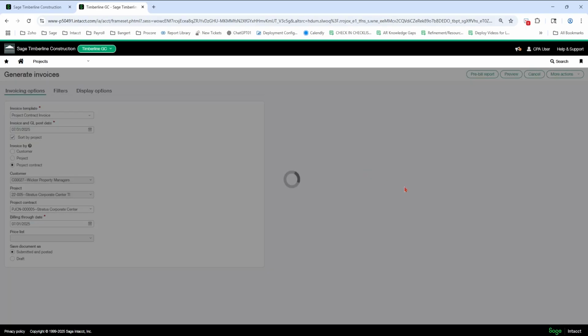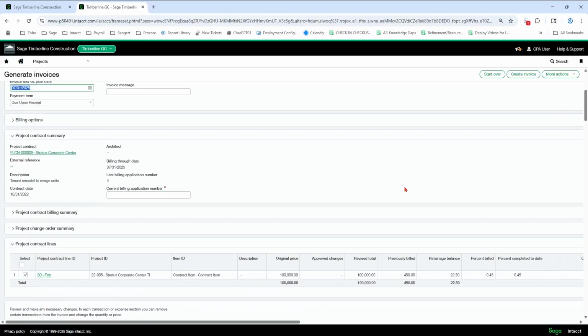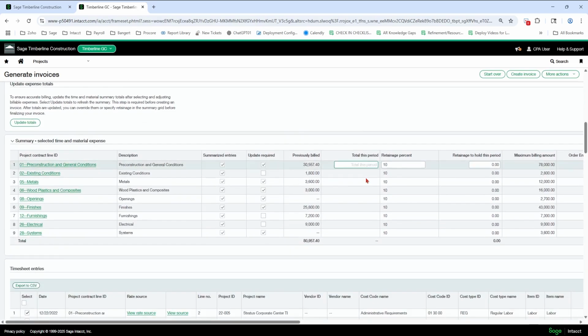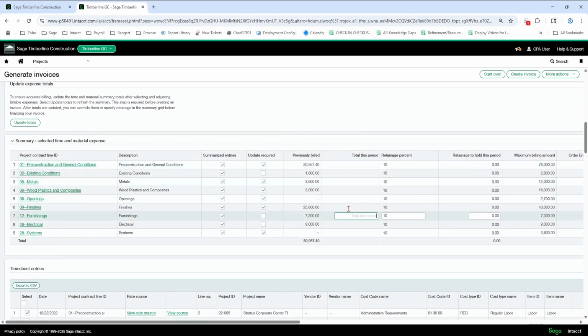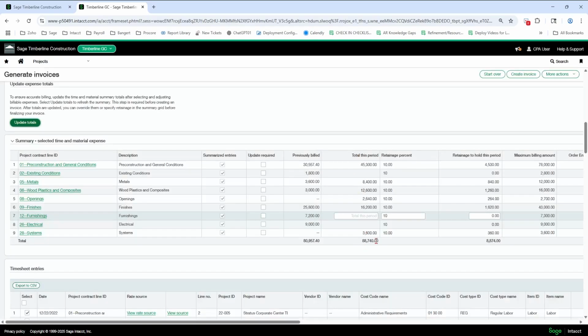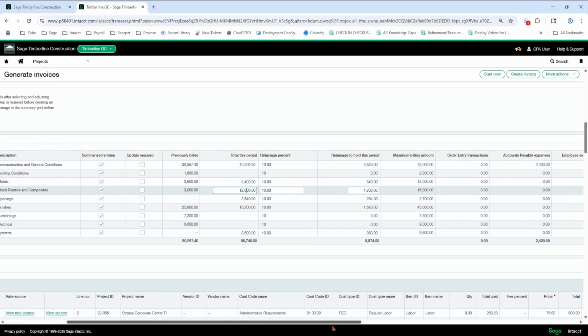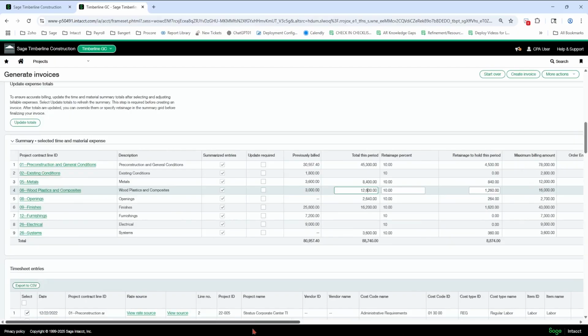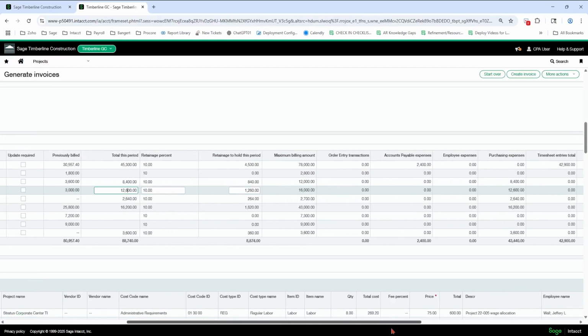You cannot use stored materials in this scenario. So down here, where I was doing my AIA, it's going to fill in for me these amounts on the AIA, right? And I'm not going to override these. That was the best practice. I have no option in this grid to put stored materials into that scenario.